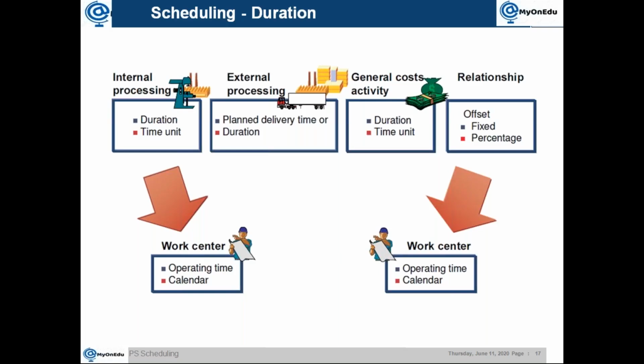So maybe you have Z1 for your normal duration, which means 5 working days. Then you can have Z7 or something like that, which is called 7 days working. So maybe Z5 for 5 working days, Z6 for 6 working days, Z7 for 7 working days. So you can create as many factory calendars as you require. Then you create holiday calendars similarly. Some holiday calendar you will use for your national holidays, maybe based on your government legal requirement. Then some you can create without that. You will say no holiday, every day is working. So a 365 days working calendar is also possible. So there is not an issue.